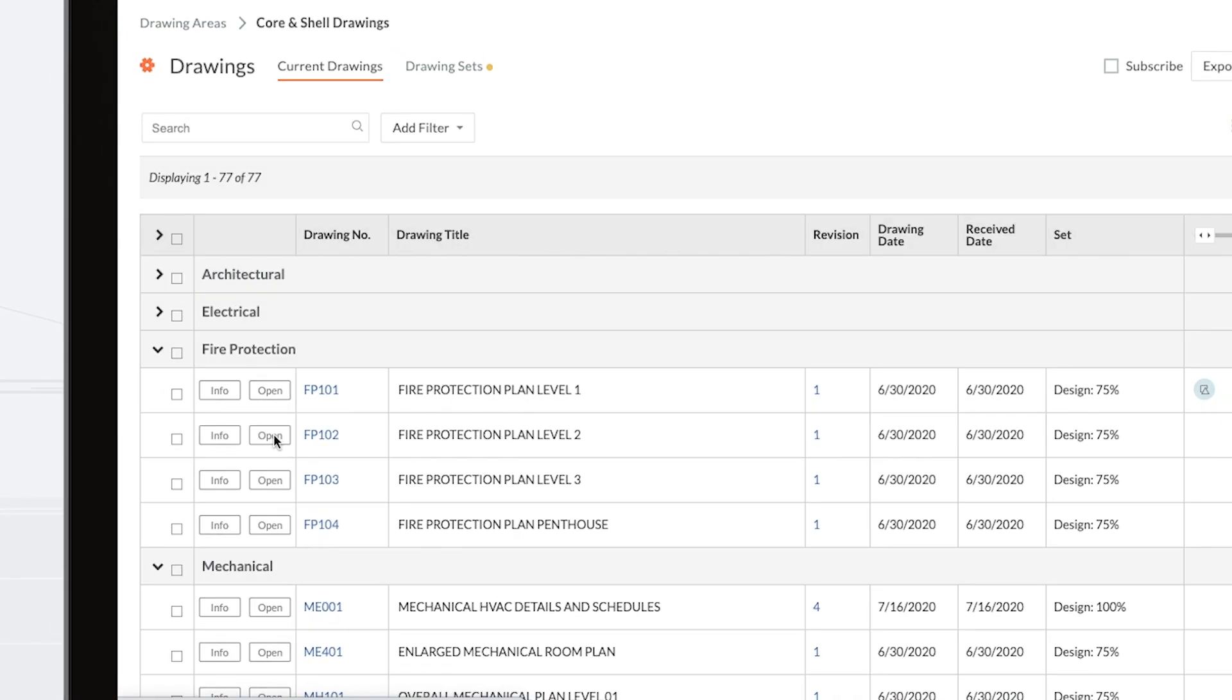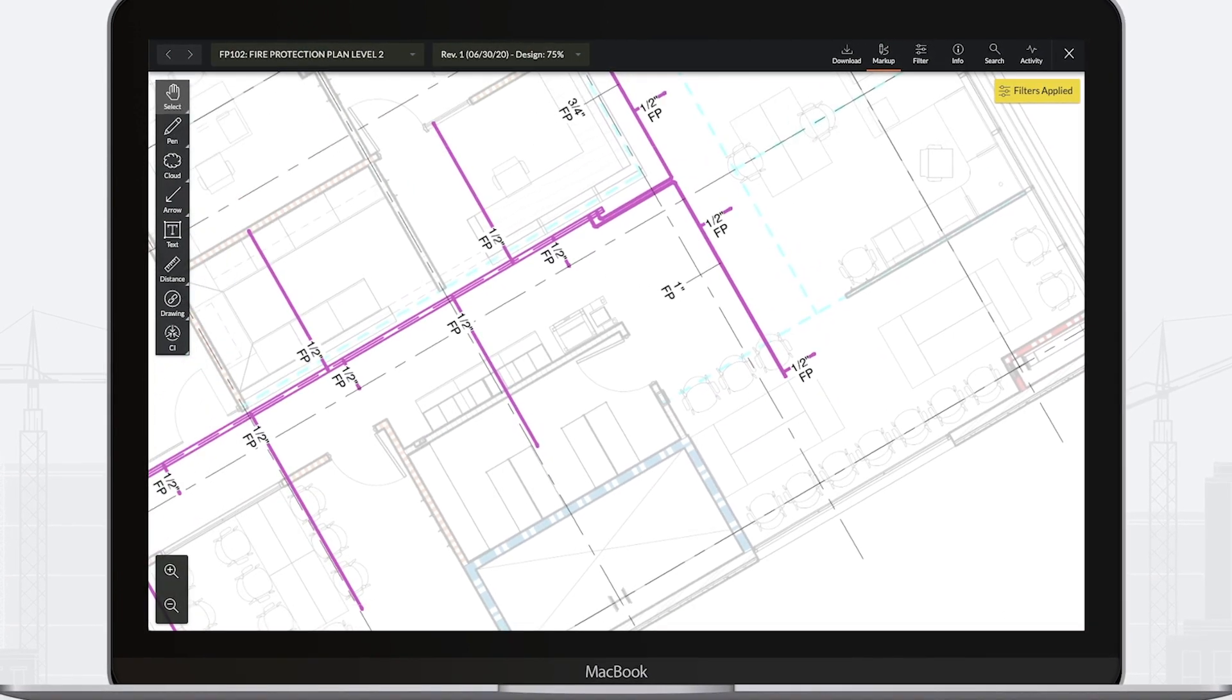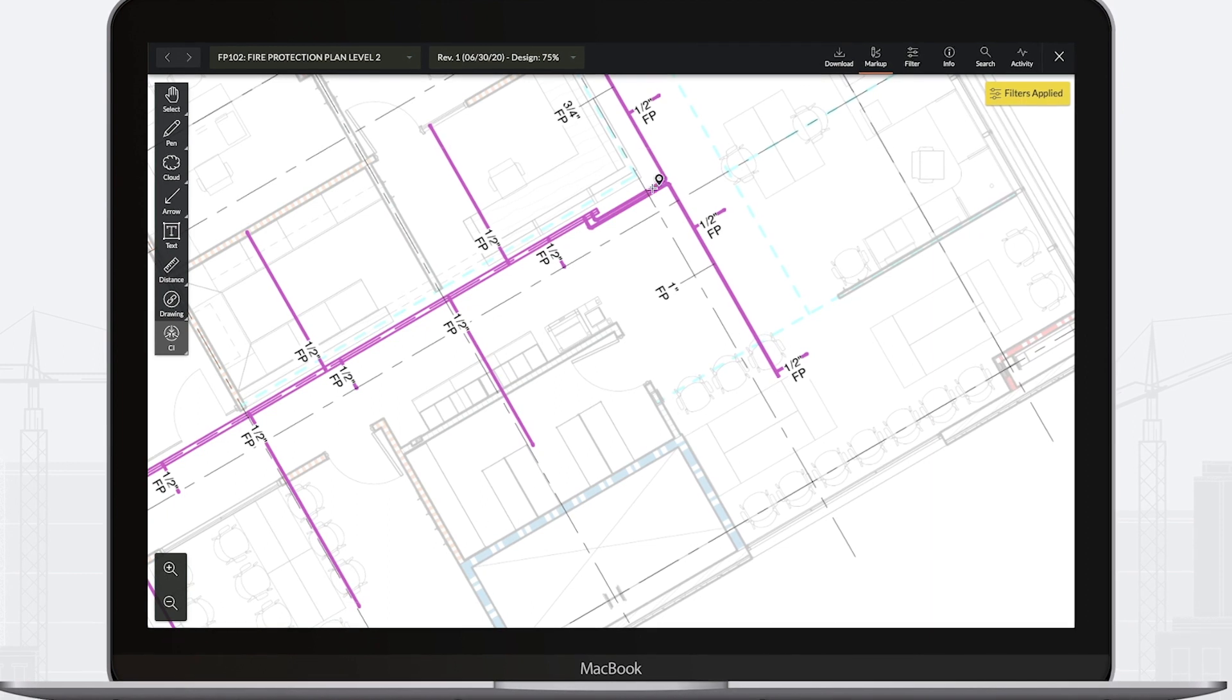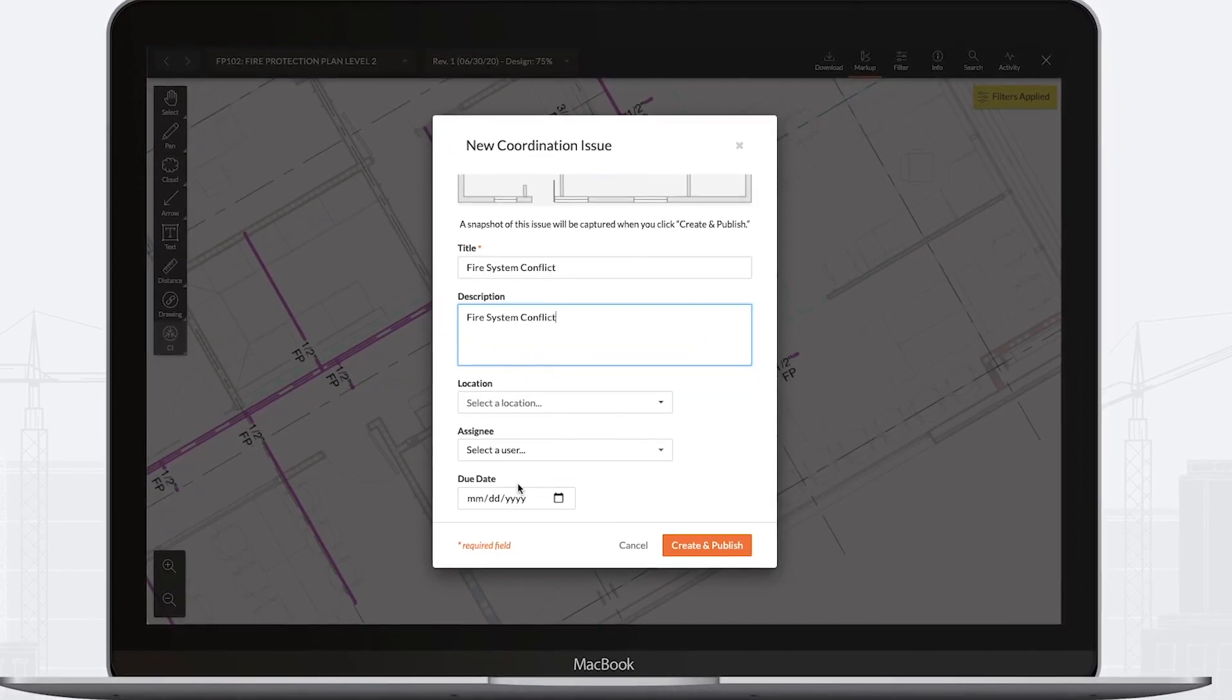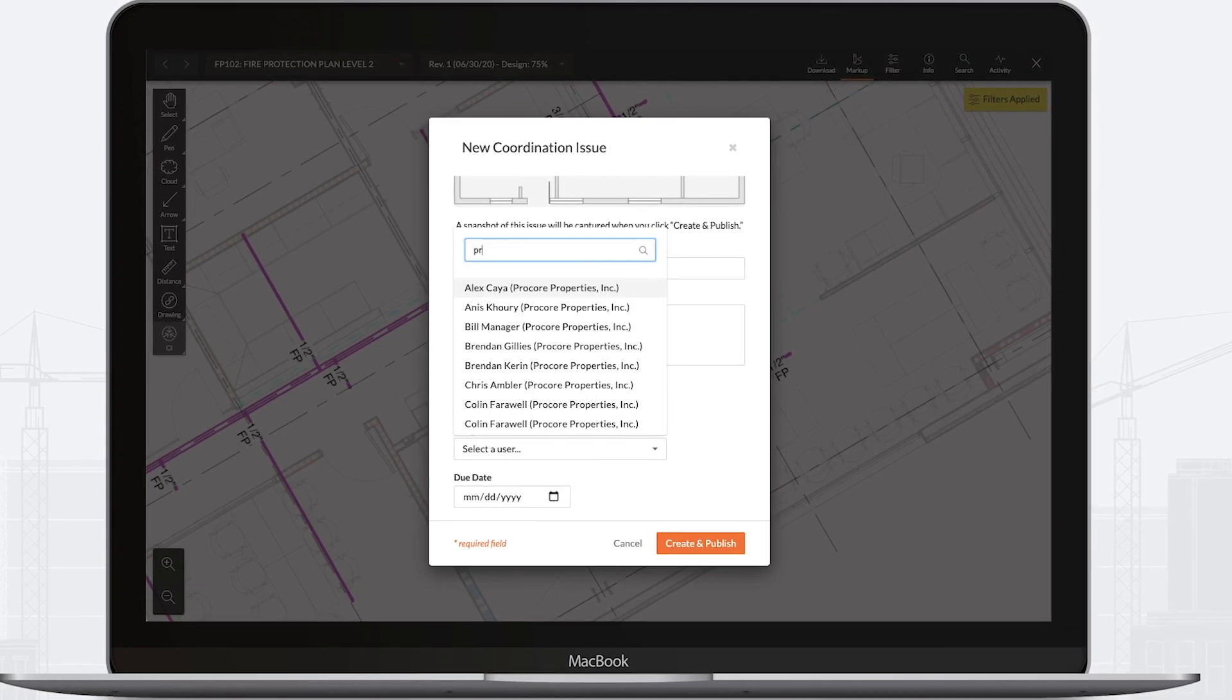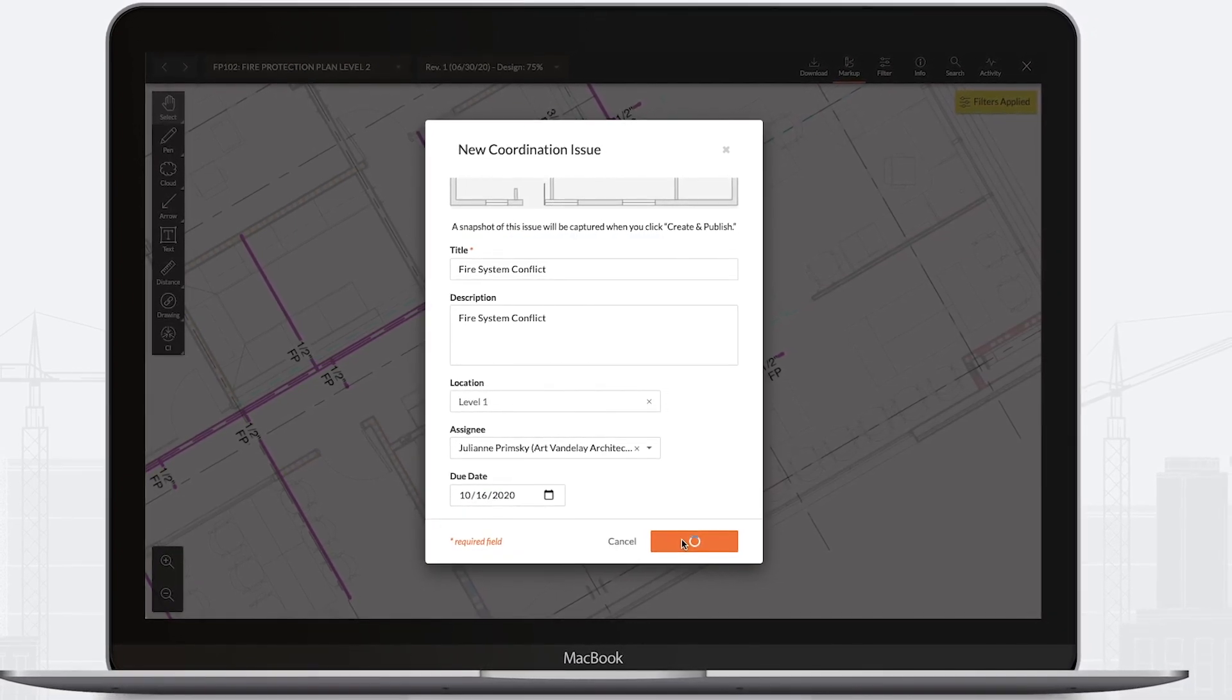Procore also helps key stakeholders collaborate throughout design and pre-construction to identify and resolve issues. You can document issues directly from the current drawings that are housed in Procore's purpose-built drawing solution. Add the issue directly to a log for tracking and assign it to the appropriate stakeholder.